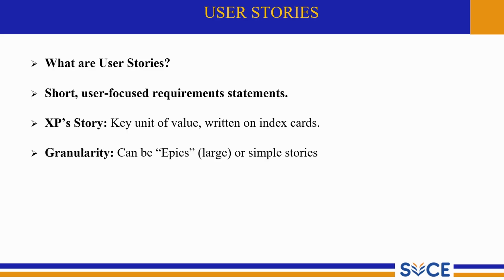XP story, key unit of value written on an index card. In extreme programming, user stories are considered the primary unit of planning and development. Traditionally, they were written on index cards to keep them simple and easy to discuss. Each story delivers a small but meaningful piece of value to the user.